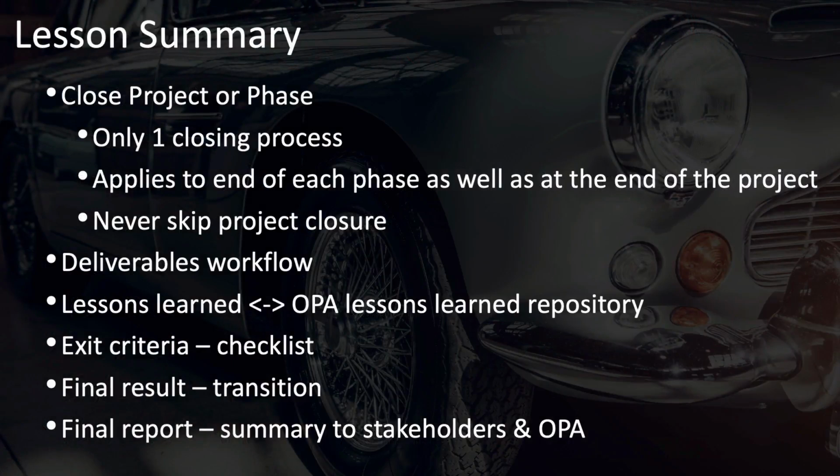A few key points to remember. You have only one closing process. It applies to the end of each phase as well as at the end of the project, and you should never skip project closure, even and sometimes especially when you terminate a project early.